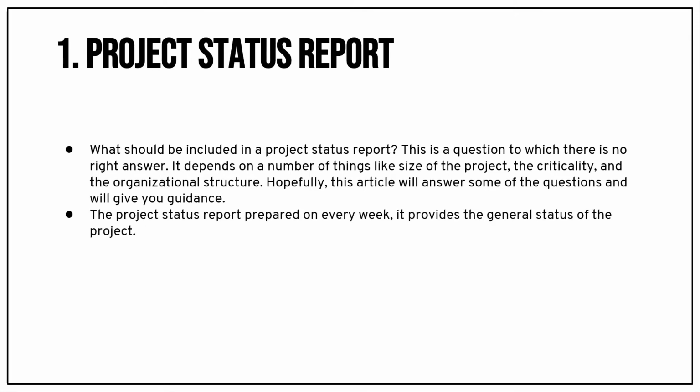The project status report is prepared every week. In some organizations we send it to the client on Friday, and they have a meeting on Monday. As per my experience, mostly they send the report to all the stakeholders on Thursday evening, and the meeting is held on Friday.